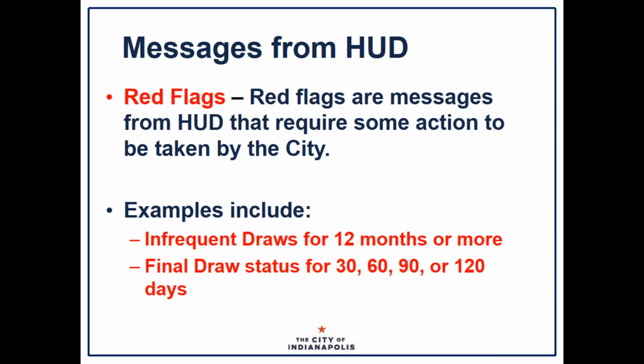Red flags are messages from HUD that we receive in our website that require us to do some type of action. Requires the city to take some type of action. For some reason, there's a project that might be concerning to HUD. So, for example, infrequent draws. So, if you're not drawing your funds when you should be or in a timely manner, then we get red flags to let us know that there haven't been any draws done in 12 months or more.